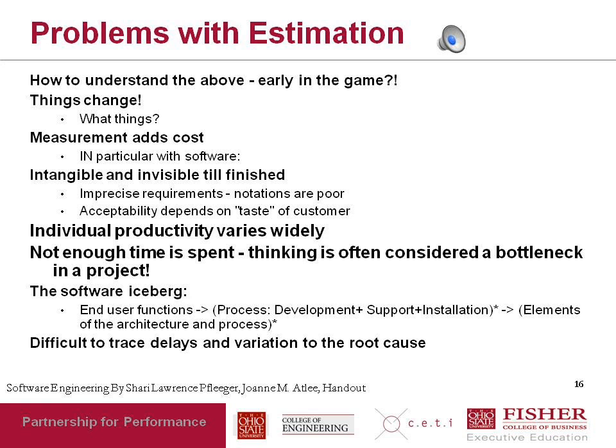And the last thing is that causality in a software project is often hard to figure out. So when there is a delay, you don't know why there's a delay without expending a lot of effort to figure things out, especially if you have a large team. One person may hold things up. You might not even know there's a delay until a few days have passed, and then tracking back through everybody's memory and chasing things down and figuring out why a delay occurred might be difficult.